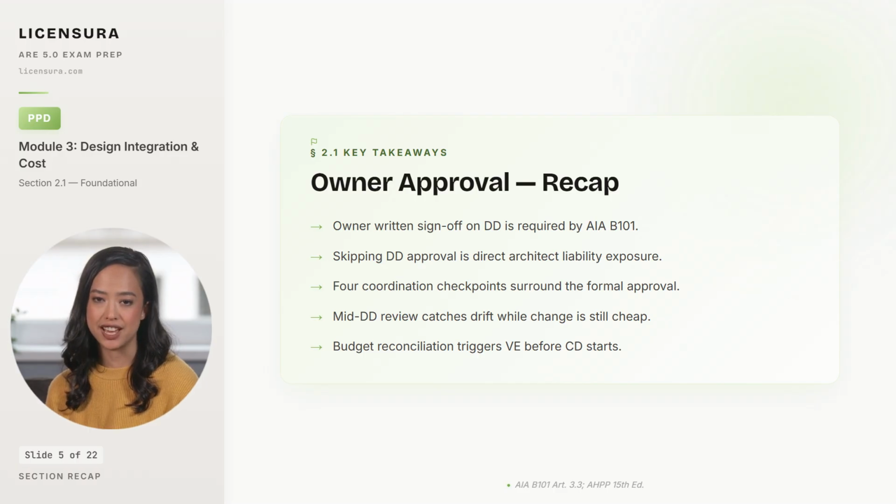And budget reconciliation at DD completion triggers value engineering before CD phase starts, because launching CD over budget guarantees painful late-stage cuts to scope, quality, or schedule.